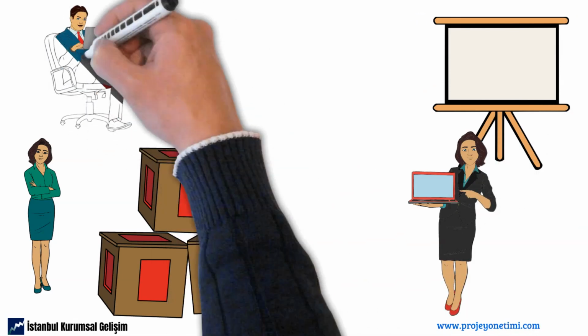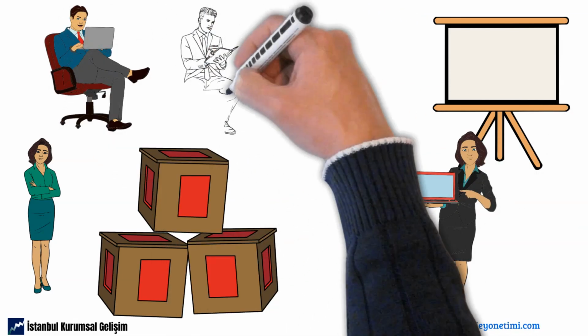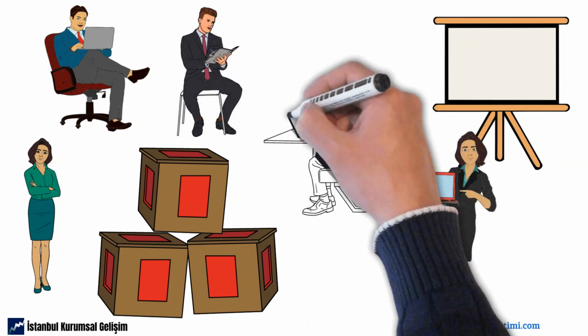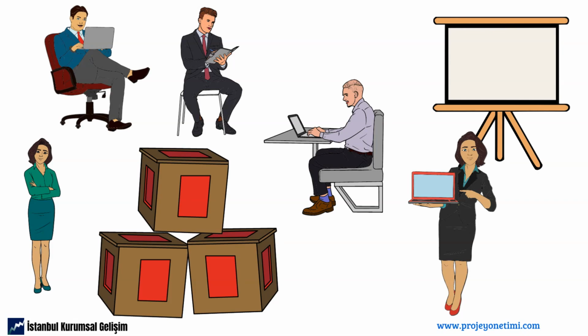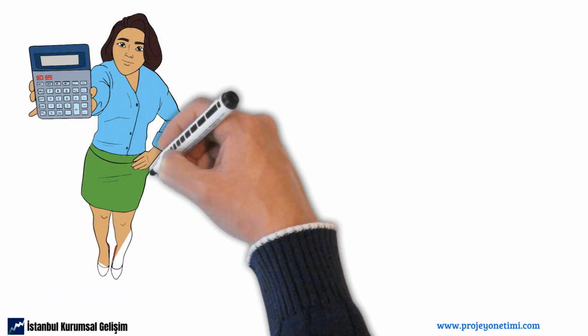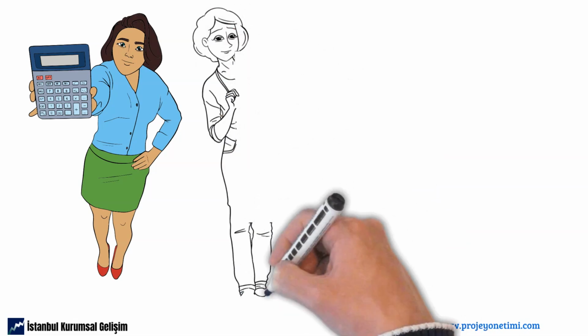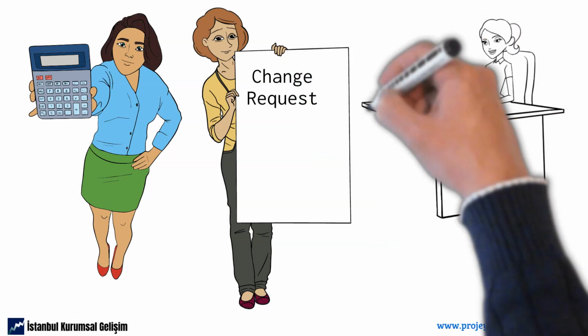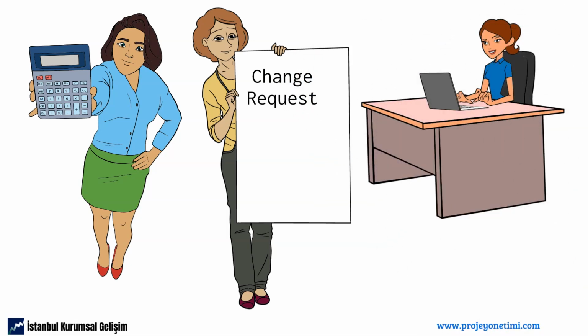It is very important to get the stakeholders to try the result with their own hands so that they can better understand the result produced. If stakeholders notice something important to fix, the Scrum team can consider it to be fixed in the next sprint. However, if the change requests are large, this request is added to the product backlog by the product owner.